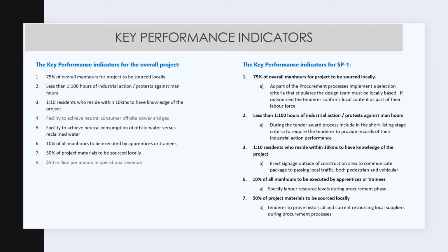The KPIs for sub-project 1 and how they can support the overall KPIs are 75% of the overall man hours to be sourced locally. As part of the procurement process, we need to implement a selection criteria that stipulates the design team must be locally based. If outsourced, the tenderer confirms local content as part of their labour force.